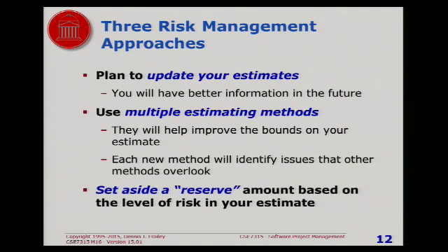Say, when we reach a certain point in our project, and exactly where that point is depends on where you think you're going to know something. Let's say you've got an iterative thing and you're going to go through 3 iterations. Well, at the end of the first iteration, you'll have a pretty good idea of how that worked out compared to what you thought it would, and then you might update your estimate based on what you learned there.